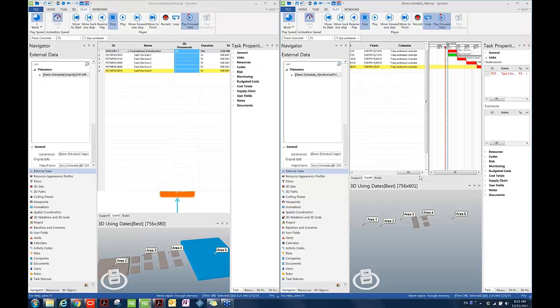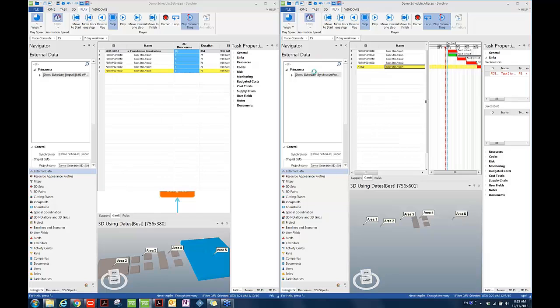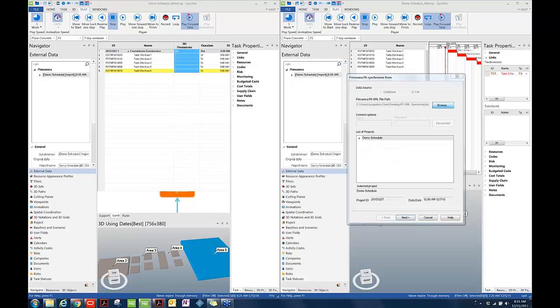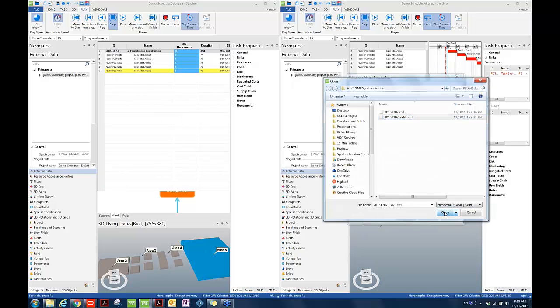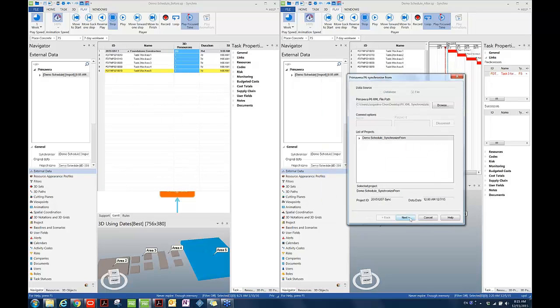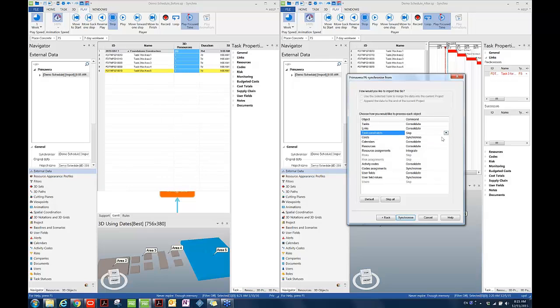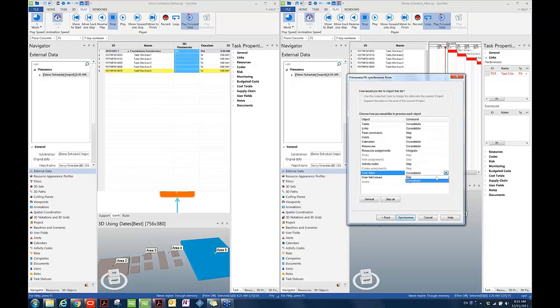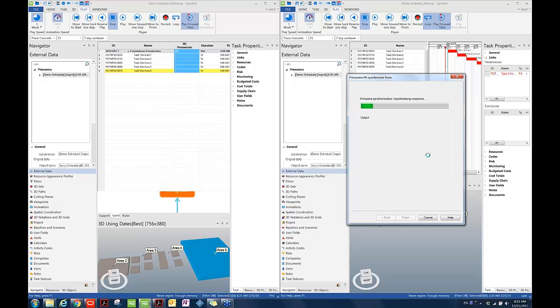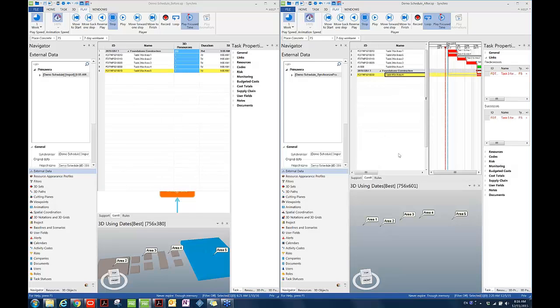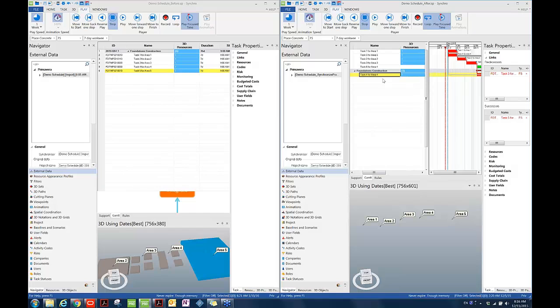Okay, since we are running out of the time, I think this is pretty much what we are presenting today. So you can always play with those synchronized options. And then just do one more thing before we end. You can choose this file and then choose a different option, which is Consolidate, to compare the difference here. And then hit Synchronize. So basically, Consolidate keeps the deleted task in length. And then the resource assignment to task 4 was not lost because the task 4 is still there. It's consolidated in Synchro.